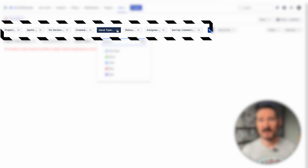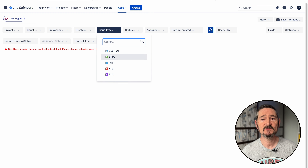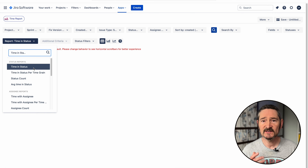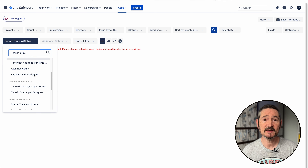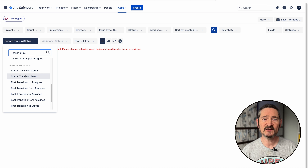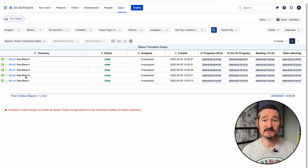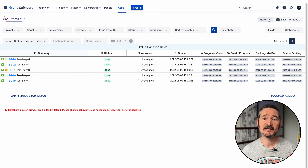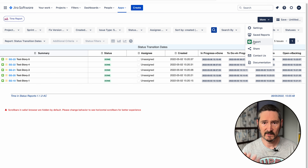There are a number of filters you can use along the top to narrow your results. I'm going to narrow my results to select only stories to appear under the Issue Type dropdown. Next, we need to choose which type of report we want to see. Timing Status has a number of different reports, but the one we're interested in is called Status Transition Dates. So we'll select that, and you can see all the transition status dates for our stories. To export this, we just click on More and select Export, which downloads a CSV file.